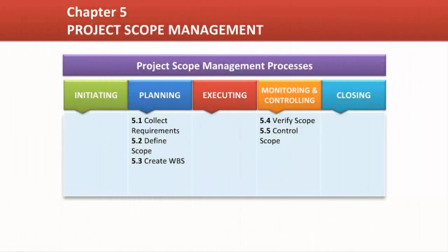Project scope management is concerned with the work that is needed to achieve the project deliverables. It includes identifying the objectives and deliverables, converting objectives into action-oriented tasks, making sure that the project team does only the work agreed upon, and verifying that the completed work meets the requirements.